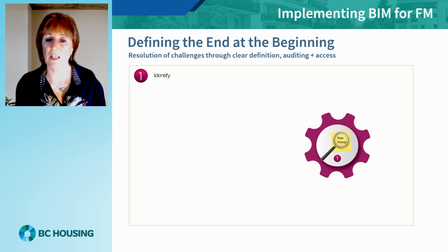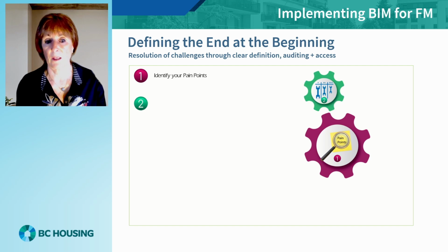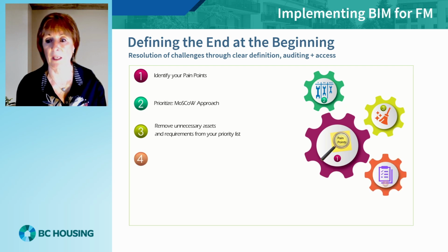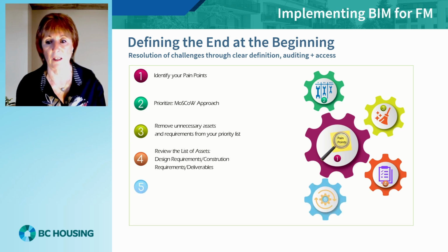Firstly, do you understand your pain points? Using a prioritization process like the MoSCoW system, must have, should have, could have, and won't have, organize your issues and remove unnecessary items. Generating and collecting data takes time and costs money to audit and check, so it is important to focus on the must-have and should-have issues initially.